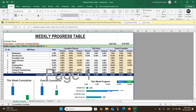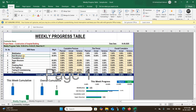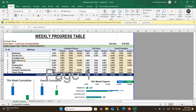Depending on your project size and activities, you can list the one-week activities. You might have a monthly schedule, and from that schedule you can import or simply write the project activities or work package structures (WPS), whatever the instructions or activities are. The main thing is to include the tasks you are going to start in this week, whether you will finish them or not.